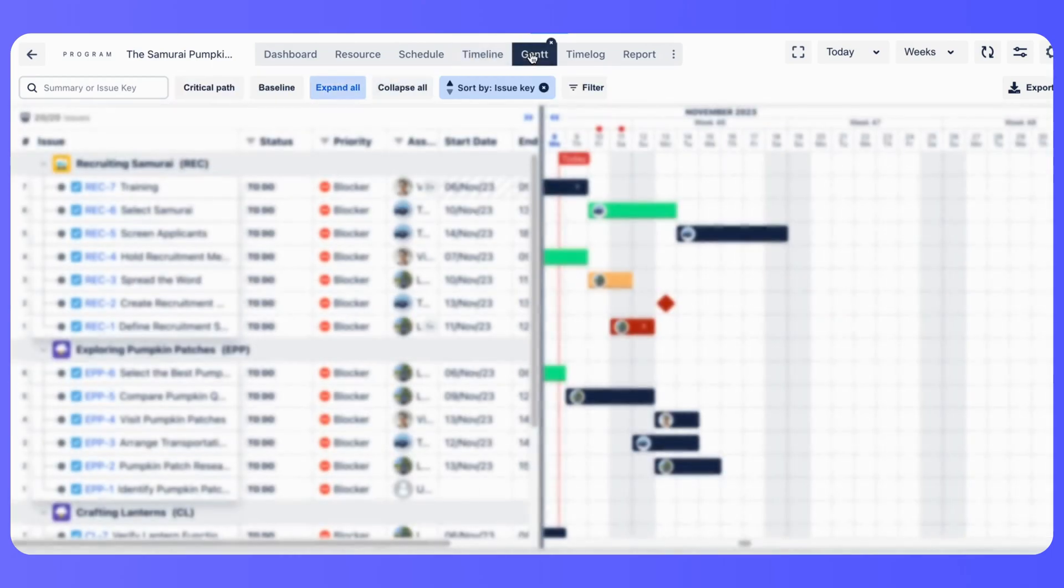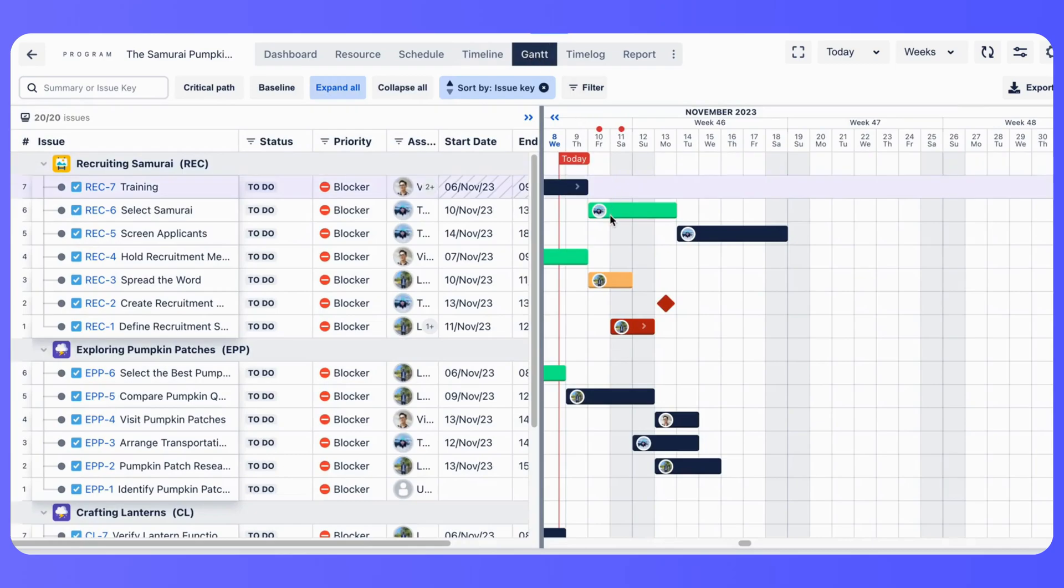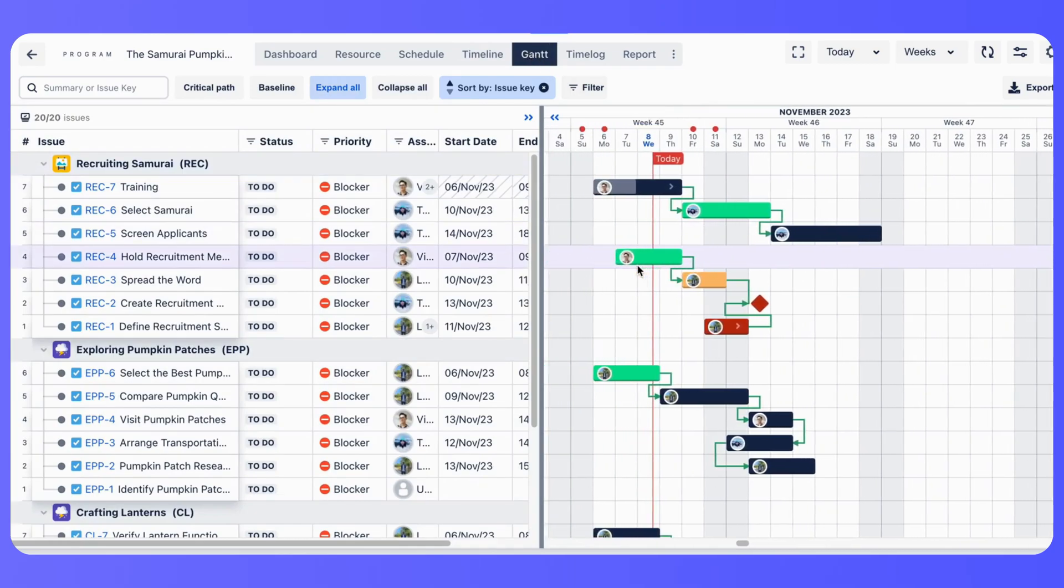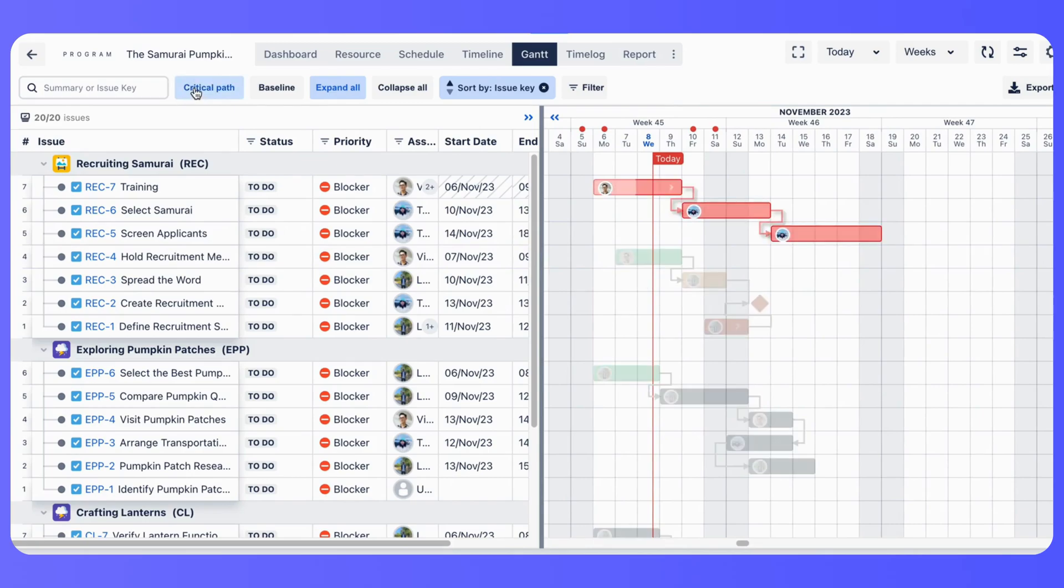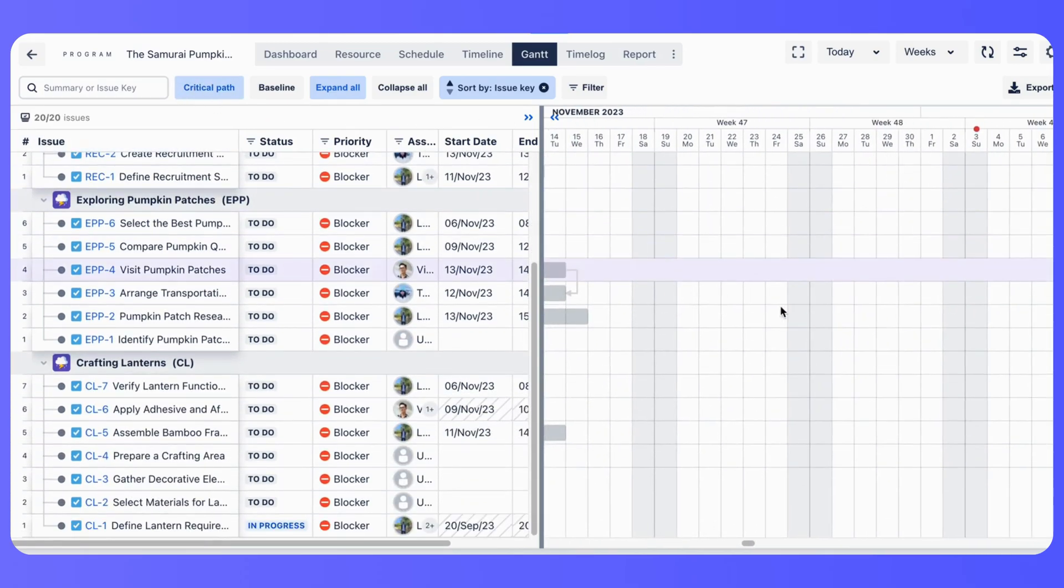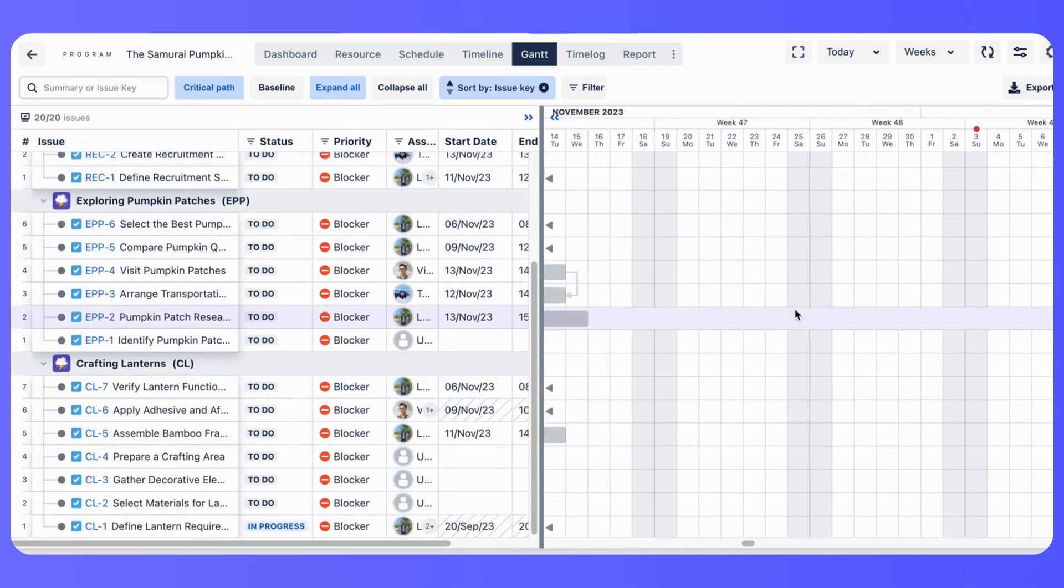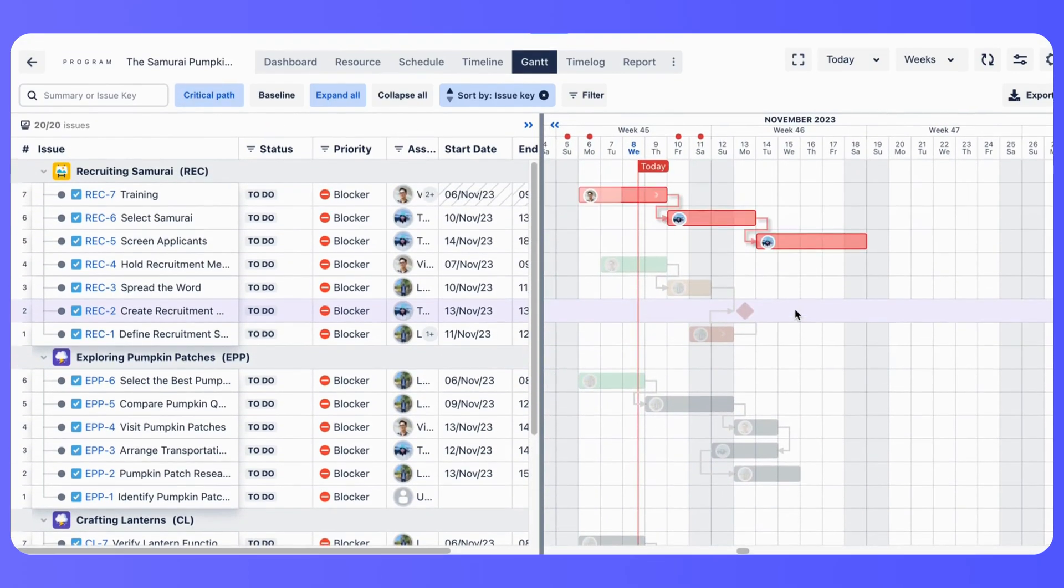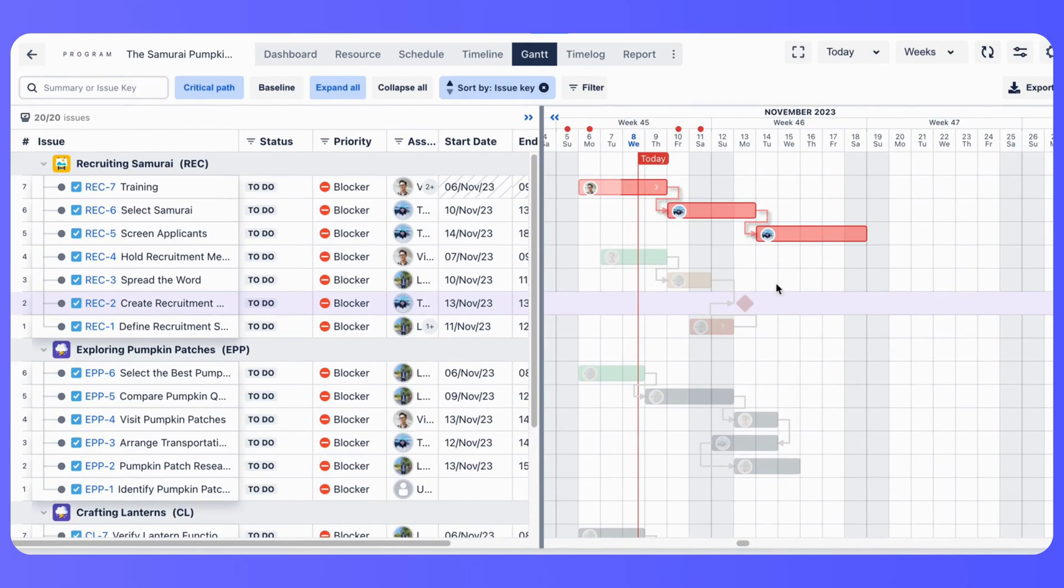While Gantt chart maintains a custom hierarchy based on the work breakdown structure, WBS, number. Gantt chart provides advanced Gantt features such as baseline, critical path, inline task creation.